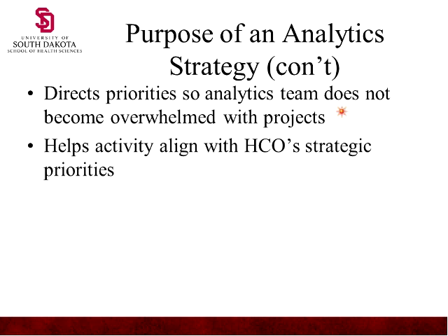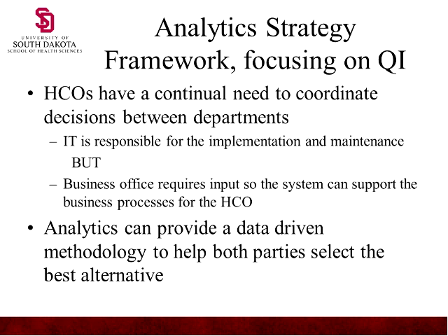It also helps direct priorities so the analytics team doesn't become overwhelmed. Everybody has a great project. Some of them require a little bit of effort, and some of them require a lot of effort. Some of them have great value, and some have very little value. So you have to be able to analyze those in such a way to say, okay, this would take 10 gazillion people to do it, and we'd gain $1 worth of effort, $1 of result. Not very helpful. Though it sounds really good, that's the outcome. And then this other project may cost us $10 and give us $1 million in return. Believe me, there are lots of those little projects around where you spend a little money and get a lot of money back. It also helps activity align with the HCO's strategic priorities. Again, I'm saying it one more time, has to align with the strategic plan.